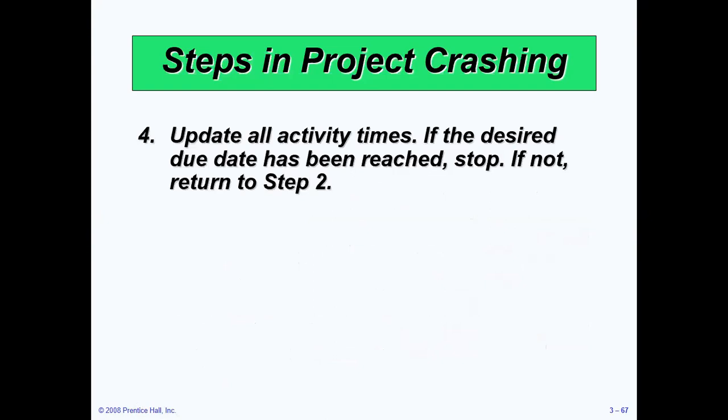The fourth step is to update all the activity times. If the desired due date has been reached, stop. If not, you have to return to the second step again.